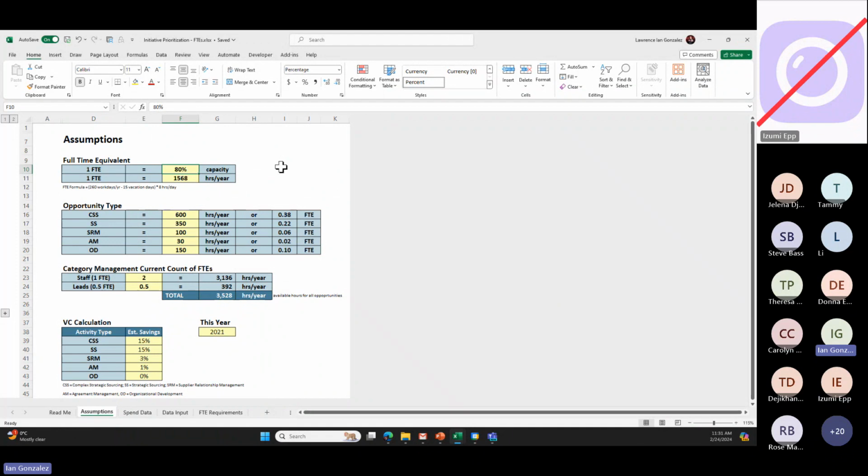Or sick days. So don't put this at 100%. Nobody works 100% capacity. Also estimate how 1 FTE is how many working hours a year. It's actually even more conservative than the other FTE tools. So there's a formula for that up here. You can overwrite it if you want, but anything in yellow you can change. Anything in blue, do not touch.